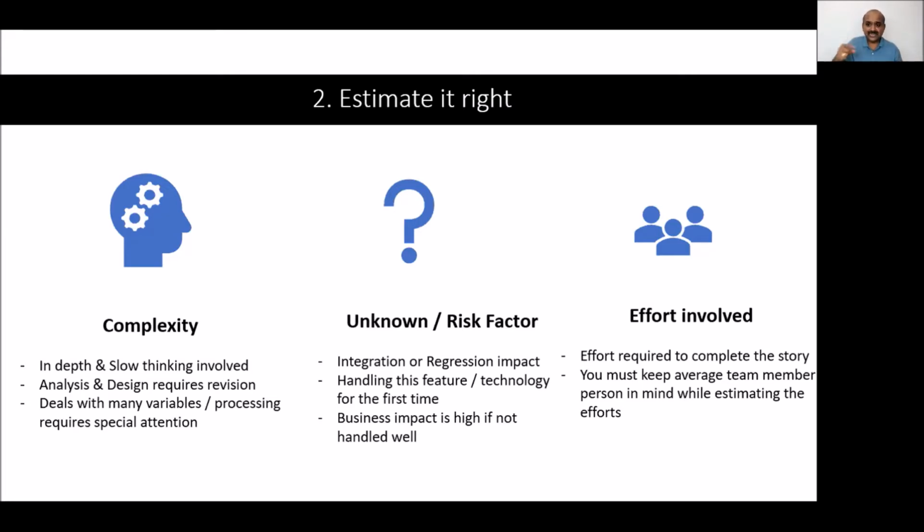Okay, if it is a repetitive task, complexity is not there. But if it is a first time task, a unique task, and it requires in-depth analysis, there is complexity involved. And if you sometimes don't award story points for complexity, we are only missing the picture. We end up working hard, but we claim fewer story points. Why? Work-wise we are doing it, but story points we are not claiming.